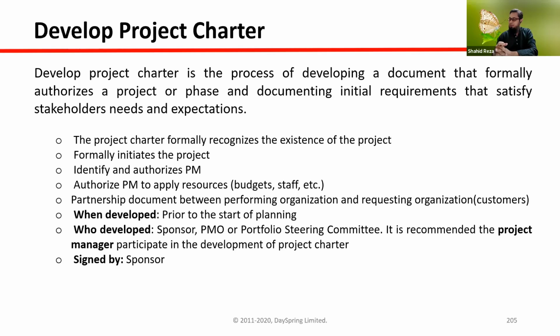As per the book, the project charter should be written by the sponsors because they know about the project, right? But practically what happens in the industry, the project charter is actually written by the project manager. He reads from the business case, benefit management plan, and other feasibility study documents, needs assessment. He writes the project charter, and then the sponsor signs on that project charter. So practically, this happens.